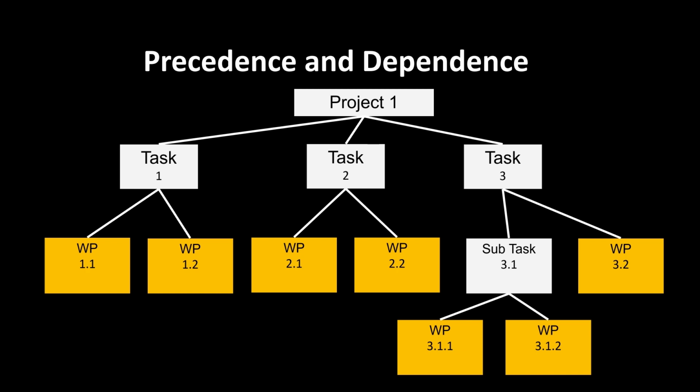All of those things come after the scope. So when we've got our work breakdown structure, just a very simplistic example here, we can start making logical choices about the linkages between these work packages. Now, what I do want to point out is I'm about to put some colours and things on screen to explain this. The colours I'm purely using for illustrative purposes. So looking at my work packages, whatever they may be, I may decide that this work package 1.1 is a starting task. It doesn't rely on anything else being done. I can start that whenever I want to.